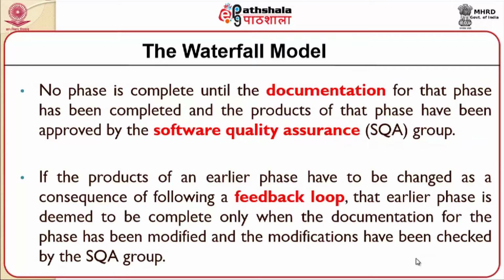More further on the waterfall model, no phase is complete until the documentation for that particular phase is done. As I have already mentioned, once I am done with the user requirements phase, parallelly I will start developing the documentation. So documentation at every phase of development of a waterfall model or any model would be of major impact. So no phase is complete until the documentation for that particular phase has been completed and the products of that phase have been approved by the software quality assurance group.